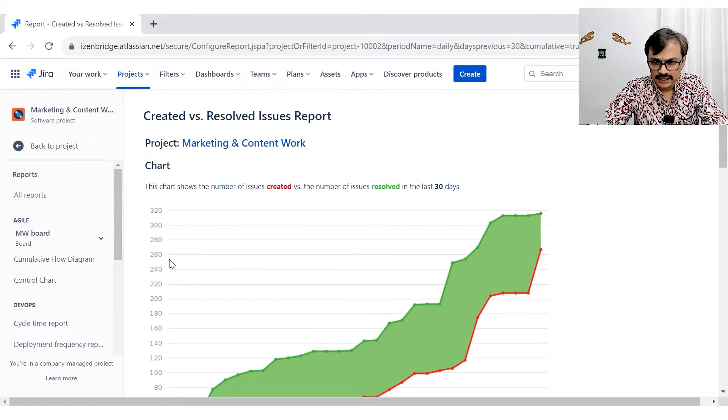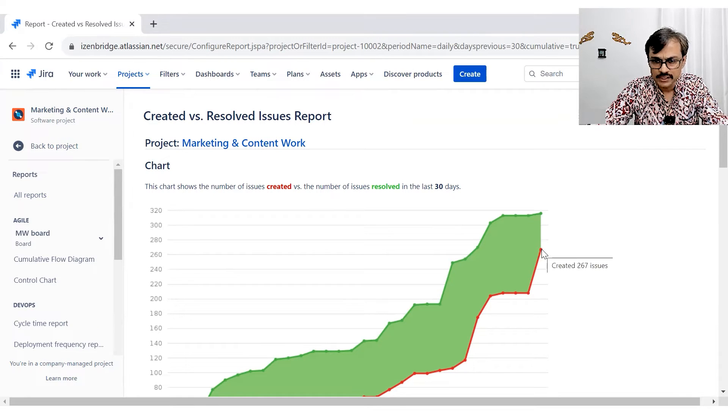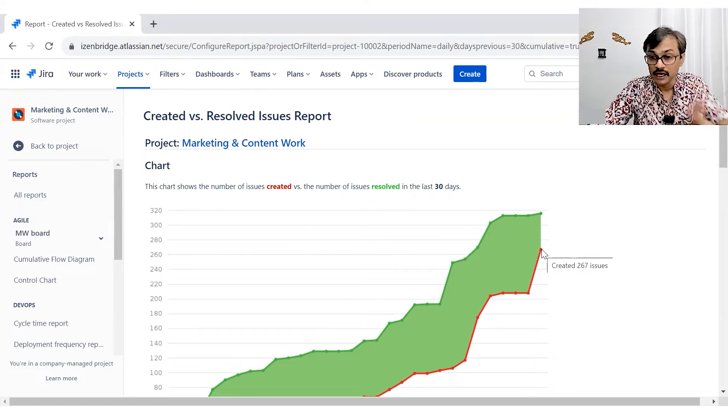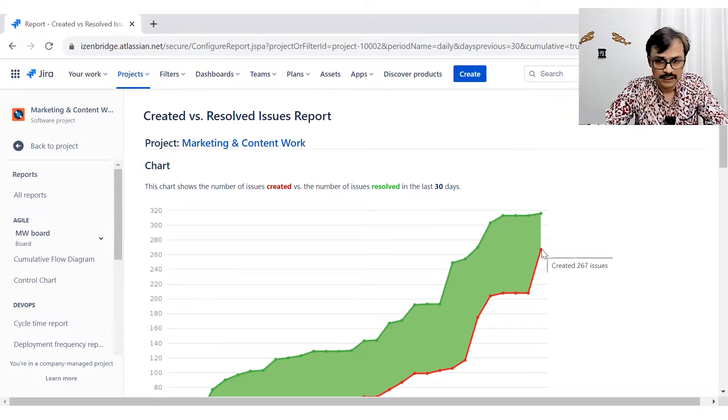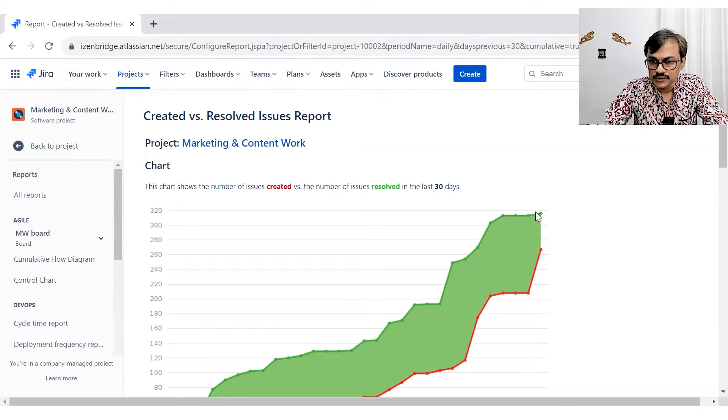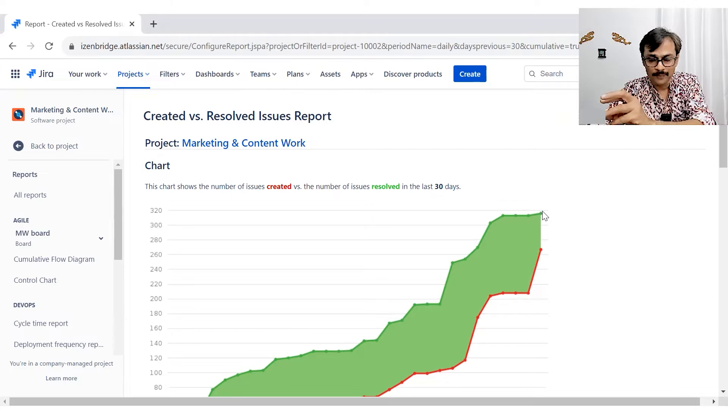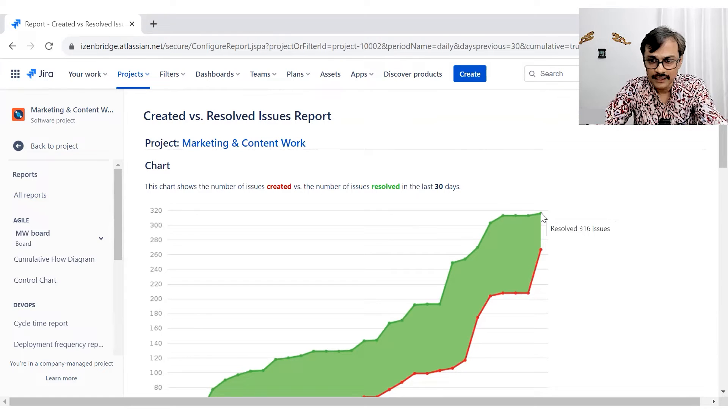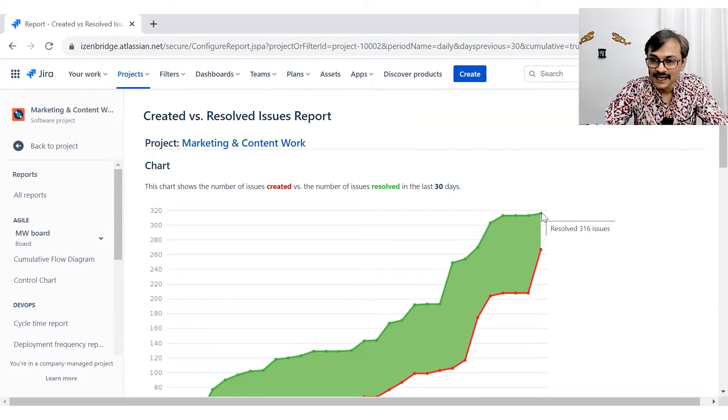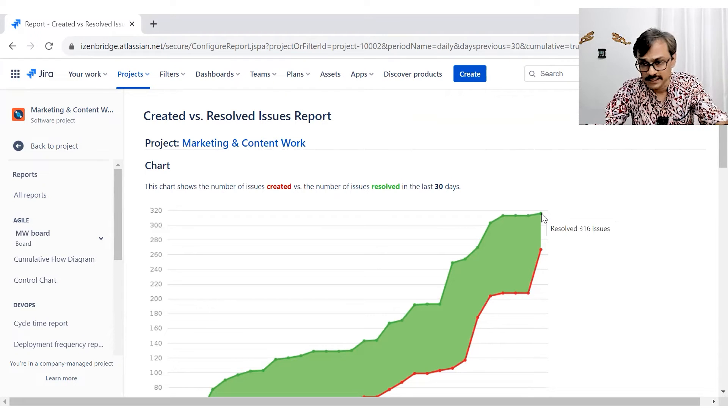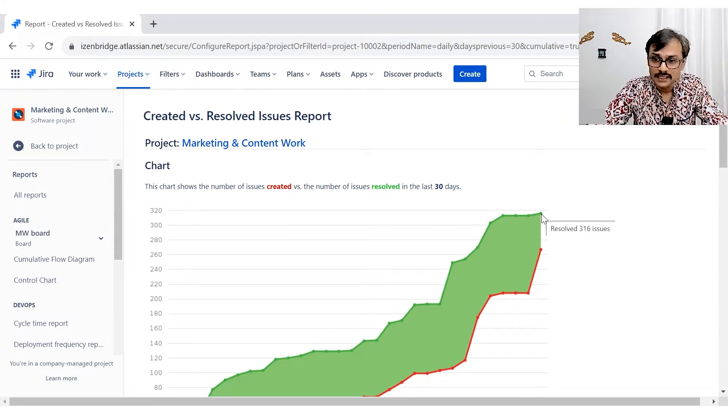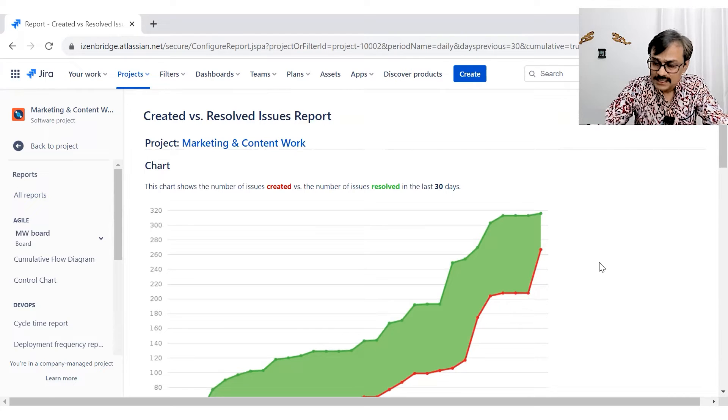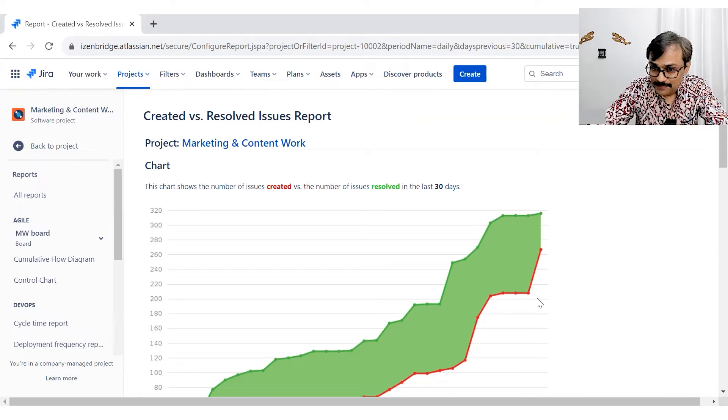So I can say one information is very clearly coming in. I can probably see that around 260 plus something. You can say 265 or 70 cumulative events got created. Yeah, 267 issues got created. The visual is also coming. And here you can see how many issues got resolved. So around I can see they are not showing it in a pop information. If I am not, yeah, here it comes. So I just need to carefully do it. Around 316 issues got resolved in this 30 days period. So I can clearly see that number of issues created were less than resolved.